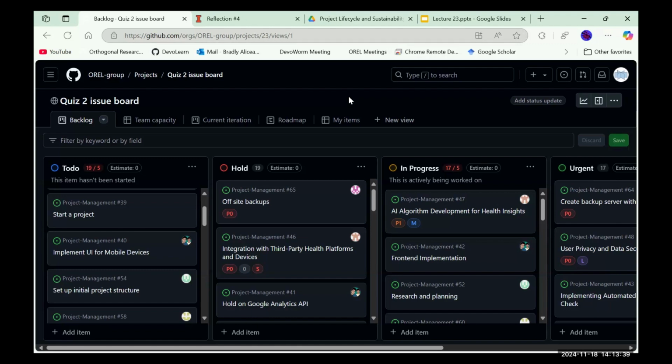You have like 60 emails, and I know who they are, but it's really better to just manage it through the board. But it's even better, if you were in an organization, to have a project manager sit there, maybe every week at a meeting, and say, let's review these issues. Let's review them by category. Actually, we can go through the completed or finished, then the urgent, then the in progress, then the hold, then the to-do. Work backwards, because you're kind of saying, here's what you've done, congratulations. Here's what needs to be done right now, so pay attention to that.